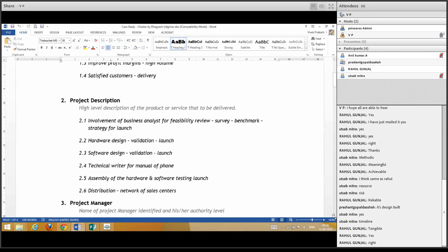High level deliverables are fine. You can write the other project related deliverables as well, such as the design of the product and the 5 prototypes of the product. So entry level means how many you will produce. As a part of this project, you will produce a few prototypes, right? After that, production will take over and they will manufacture it. Correct? And there will be support also to the production. So if production faces some problem, you have to support it, right?